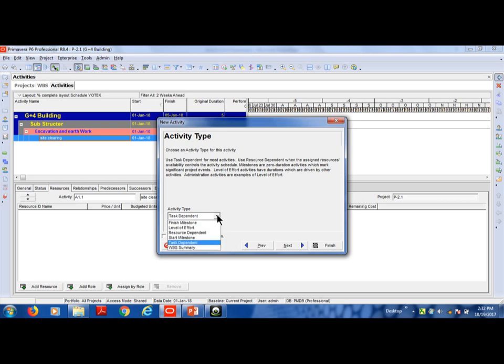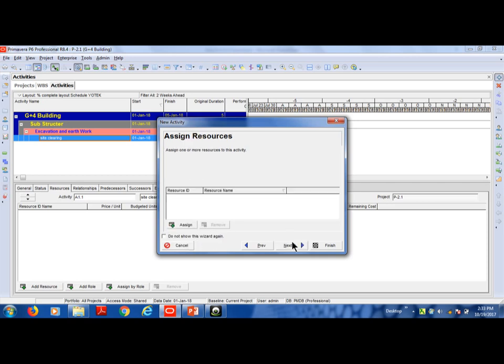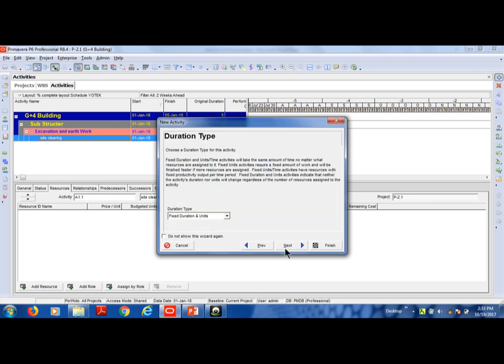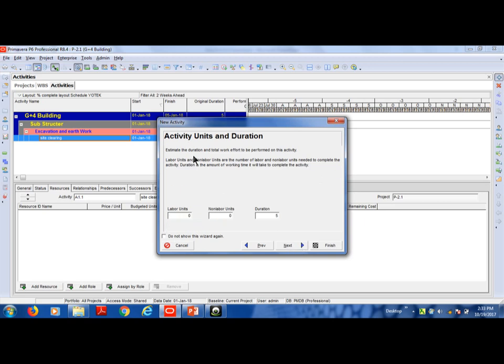Next is Activity Type — set it to Task Dependent in detail, going through each option one by one. Then for Resource Duration, set the Duration Type. By default, it is Fixed Unit. Set the duration value — for example, 5.